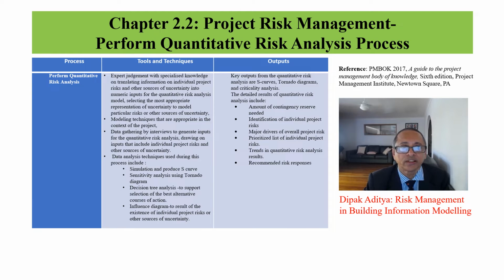Perform quantitative risk analysis. This is not required in all projects. Modeling techniques are used in this process. The tornado diagram is presented in the sensitivity analysis. The Monte Carlo analysis produces an S-curve representing the probability of achieving any particular outcome.